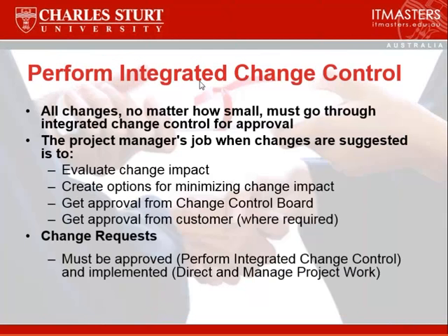Moving along to perform integrated change control. From the moment that your project plan is in place and signed off, it is more than likely those plans are going to change. So change should always be documented, and no change should be undertaken to scope, time, cost, etc. without having a change request. So no matter how small the change is, it should go through integrated change control for approval. So the project manager's role is to ensure that they manage the change and they get appropriate authorization to make any changes that are required.